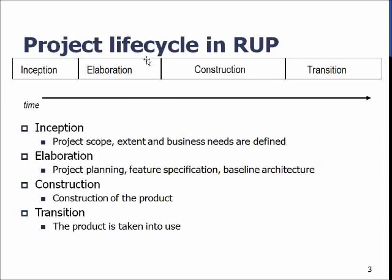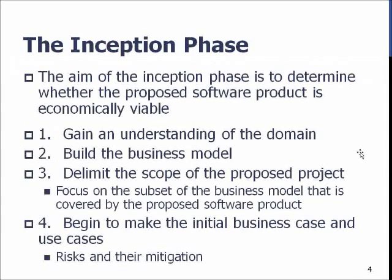The actual architecture definition work happens in Elaboration. During Inception, the idea is to create the domain model and the business model. The first and most important thing is to gain understanding of the domain in which we work — for example, if we're building something for airport security, we need to understand how airport security works; if for a game console system, we need to understand that domain and its audience; or if for law firms, we need to understand their documentation work.